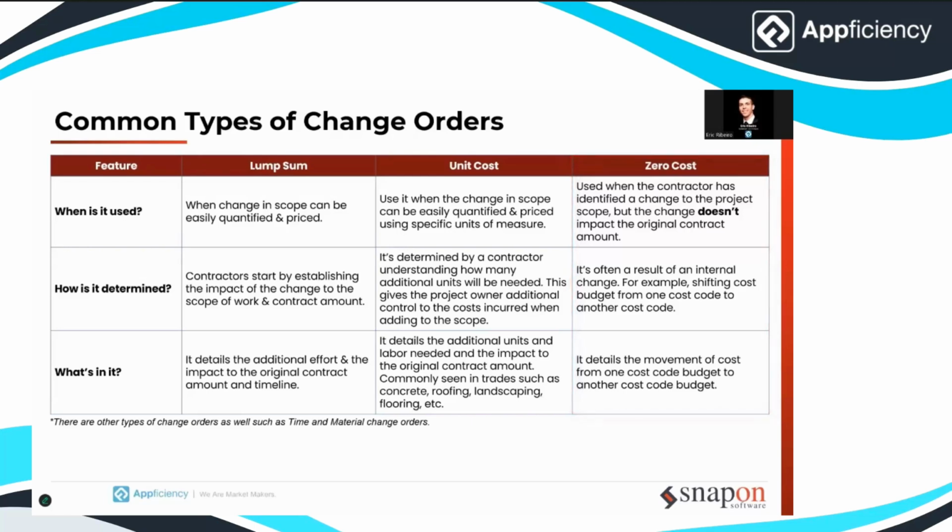And then the other one that I just want to mention here is time and material change orders. It's another very common structure that we typically see, and this is often used when the scope of work is, I would say, more uncertain and hard to define upfront. So let's say you're working under a fixed price contract, but your customer asks for additional work, something outside the original contract, and they want it billed on a T&M basis.